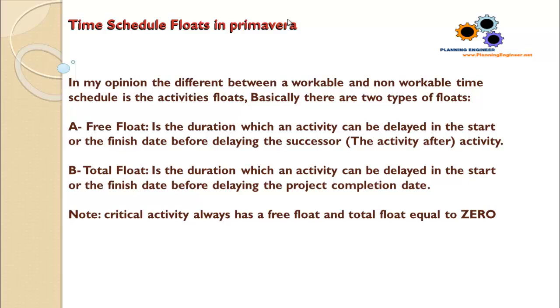The total float is the duration which an activity can be delayed in the start or the finish date before delaying the project completion date.